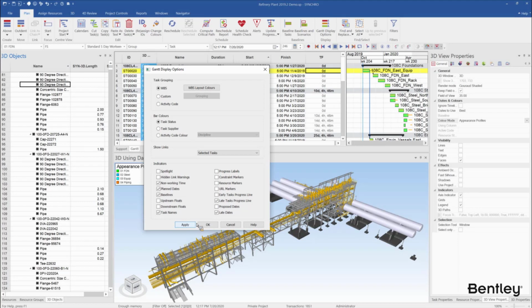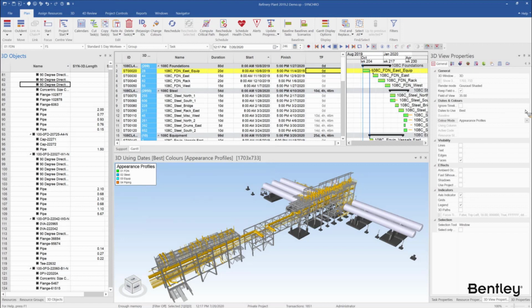You will be able to see when's the latest that this task should start or finish without impacting the overall project duration. In addition to that, you can use late dates in dates to use in your 3D window for animation or playing focus time within SYNCHRO Pro.